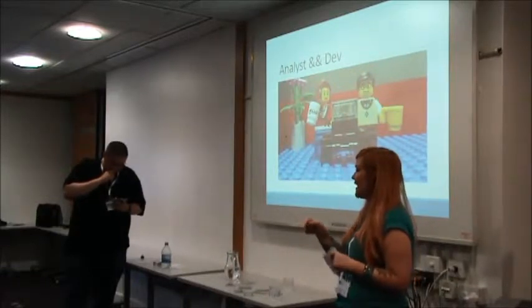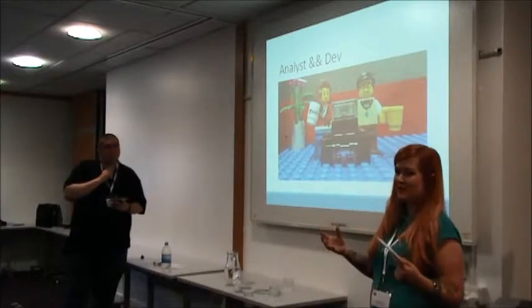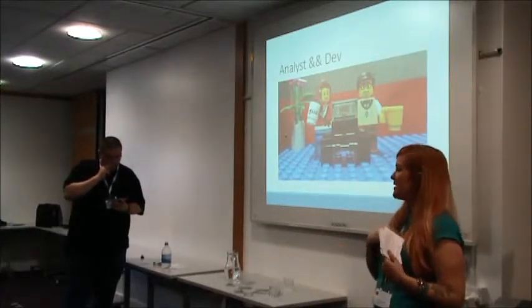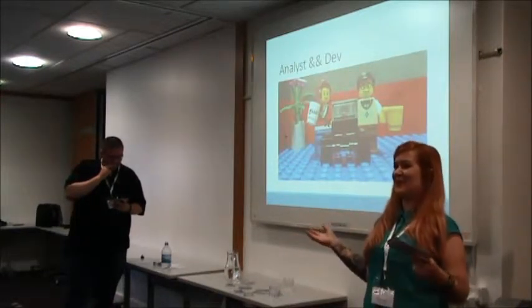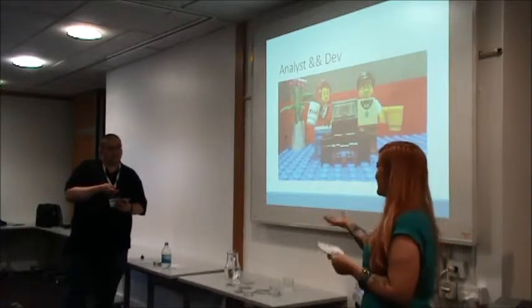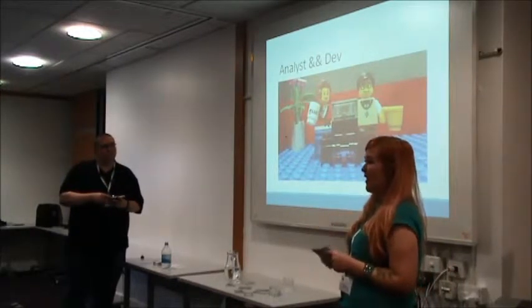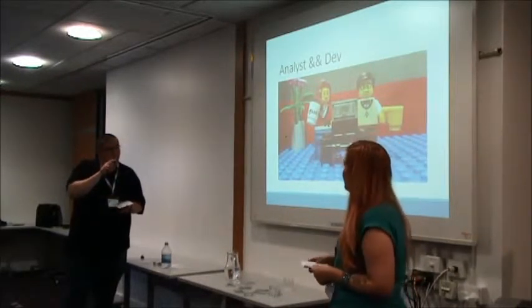For those that were just here in the estimation one, it's really useful to have two people from different contexts working together to actually have a vague idea of how long it'll take. Because me as an analyst, I can go, well, I know a dev team at one point did something similar and it took them a week. So let's say it's a week. Whereas understanding the code base and having that input early means that we could actually have a better idea of how much time the work is going to take, or when we're speaking with the stakeholders.